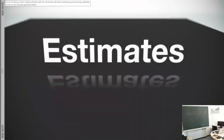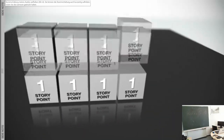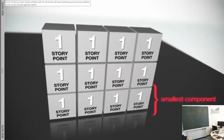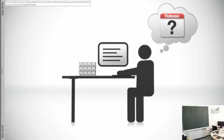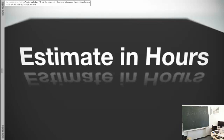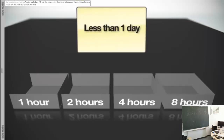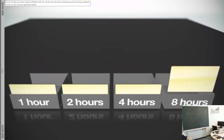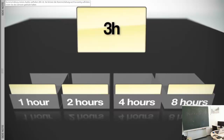A quick side note about estimates: there are a lot of techniques for creating good estimates. Some prefer estimating in story points, where estimates are made relative to building a small component with a known level of difficulty. Unfortunately, story points don't answer the question of when will my project ship. The best technique is to estimate work in hours using standards: things that take less than a day are estimated as one hour, two hours, four hours, or eight hours. Every item will fall into one of those buckets — there will be no three-hour estimates, for example; a three-hour item falls into the four-hour bucket.